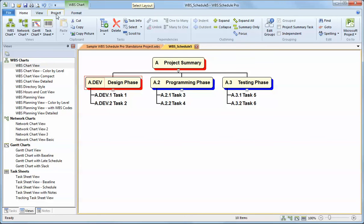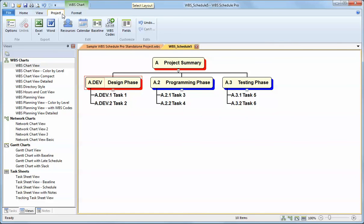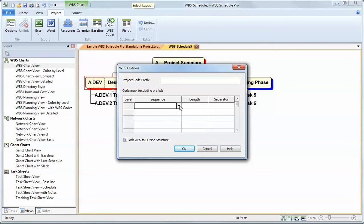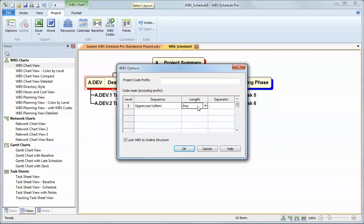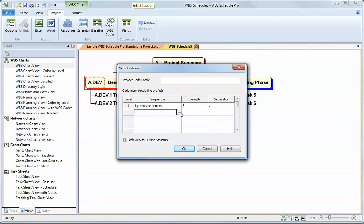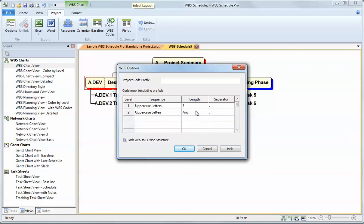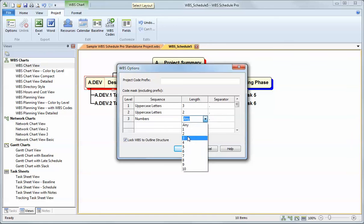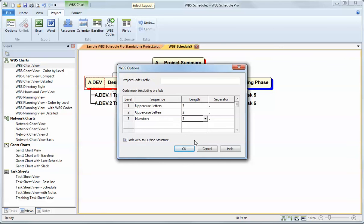That's a very handy way to easily recode your WBS chart in the WBS Schedule Pro program. There's also the concept of a WBS mask. You get to that using the Project tab and the WBS codes where a mask, you can make the coding conform to your specifications. Like if you had a certain number of letters in your WBS code, maybe three digits at the first level, two letters at the second level, and then maybe three digits at the lowest level, I can create a mask that as you go down the tree, it will automatically code corresponding to the mask that you've defined here.